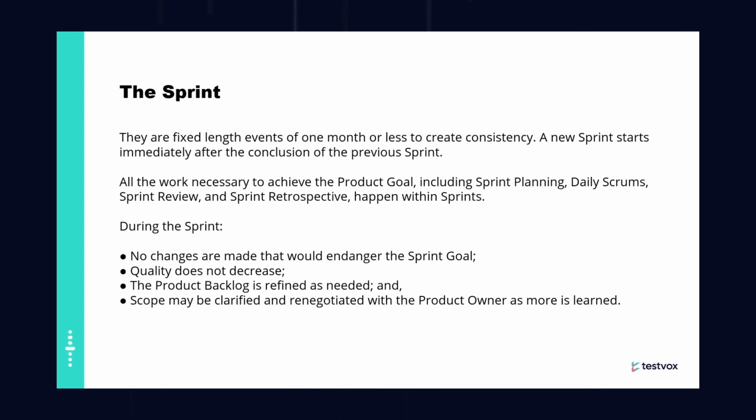But less than 2 weeks is not reasonable. If you have it as 2 weeks or 1 month, and something is wrong during the sprint, during the sprint review we can always go back and fix it. If you're going to have a sprint at the end of every 6 months, there's no point of having a sprint. It's more of a waterfall based project.